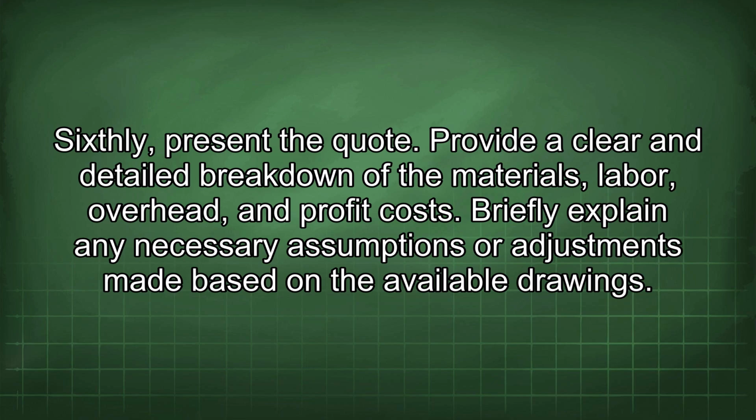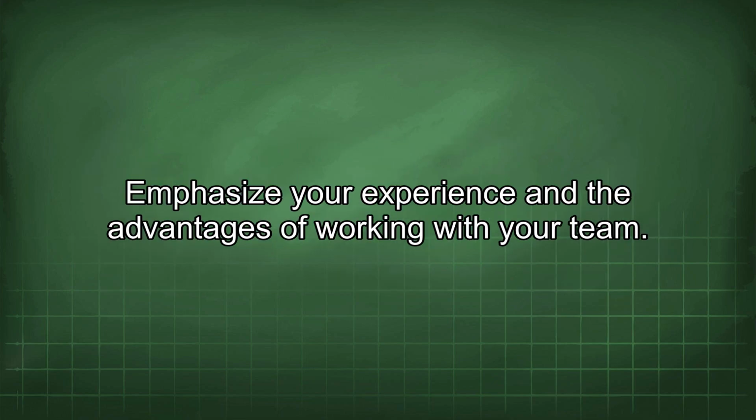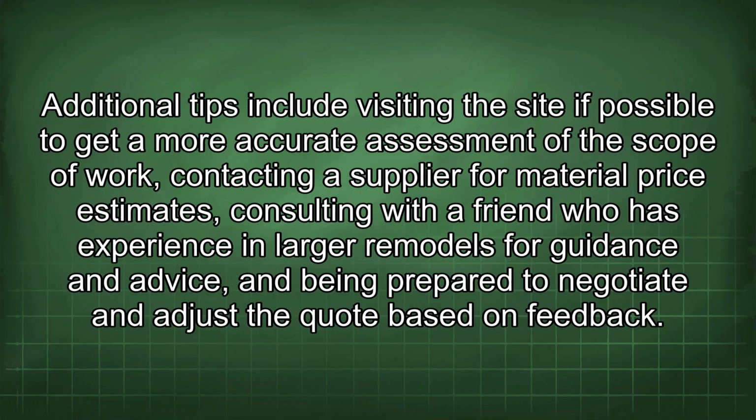Provide a clear and detailed breakdown of the materials, labor, overhead, and profit costs. Briefly explain any necessary assumptions or adjustments made based on the available drawings. Emphasize your experience and the advantages of working with your team. Additional tips include visiting the site if possible to get a more accurate assessment of the scope of work, contacting a supplier for material price estimates, consulting with a friend who has experience in larger remodels for guidance and advice, and being prepared to negotiate and adjust the quote based on feedback.